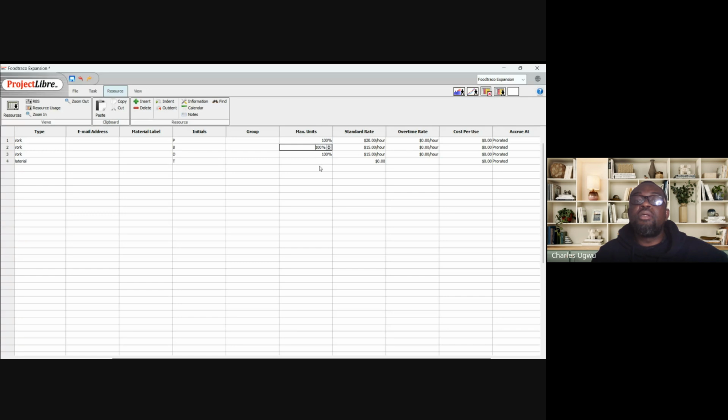And if for instance we want any of them to be working part-time, maybe 50% of their time, we need their input, or we can decide that we need them part-time, that is the usage here. But all of them here are working full-time. So it's just 100% input we need from them. And we can leave our resources like this for now.